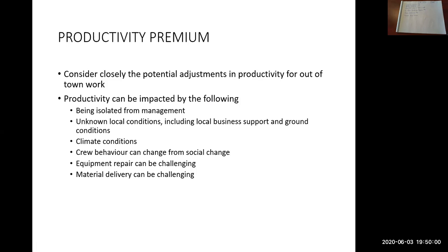If the crew is used to seeing a manager on their job site every day or every second day, they will be more productive as compared to having management show up once a month. Even though the supervisor's there every day, productivity will go down. Now, how much it goes down is, I mean, basically anybody's guess, whether it's, you know, 2%, 5%, 10%, it's some amount.